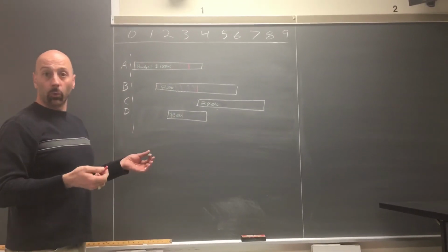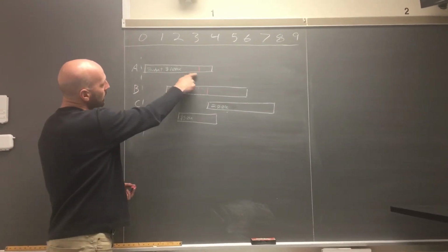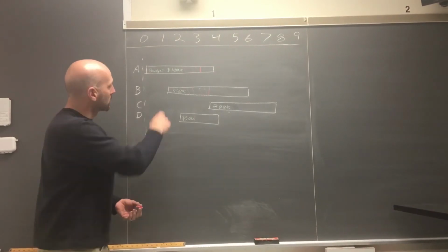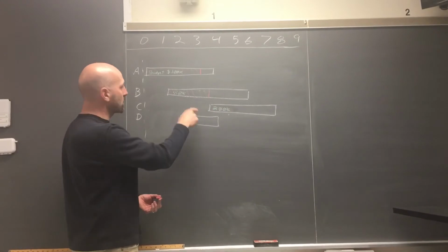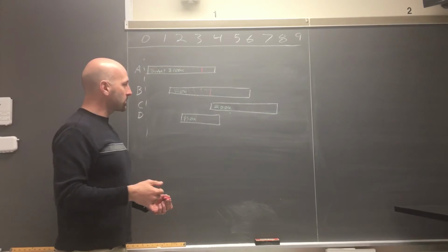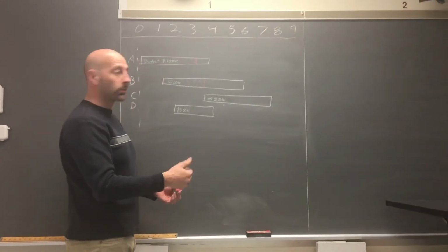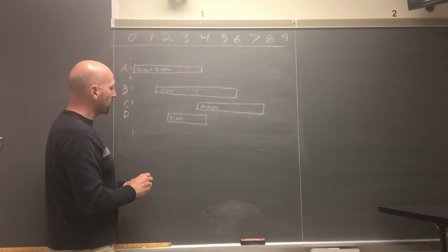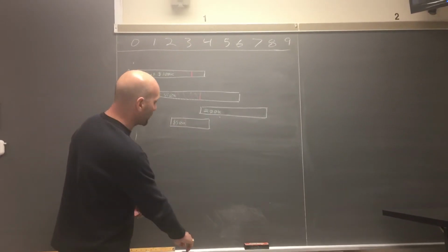So for earned value, I look at what's actually been finished. We'll say 80% of a $100,000 task is done. I've earned $80,000. I'm sorry, 5/8, so 62.5% of an $80,000 task is done. I've earned 5/8 of that, so I've earned $50,000. I haven't done anything of this $200,000 task. I've earned $0. And I've done, we'll say, 2/5 of this $50,000 task, so I've earned $20,000. So that's earned value for each of these.